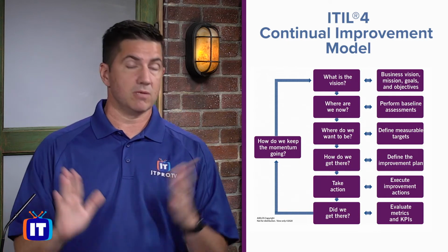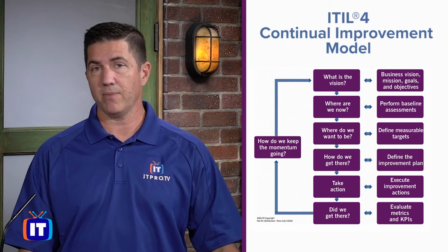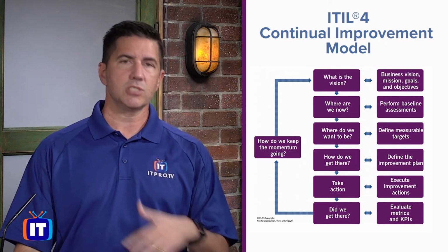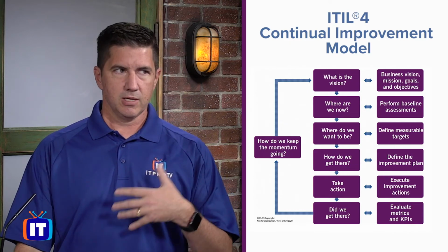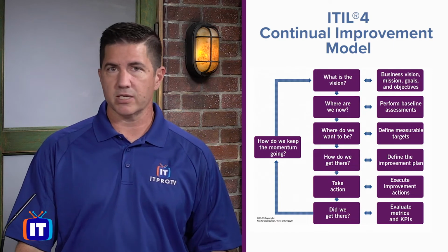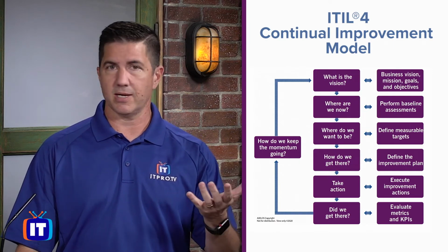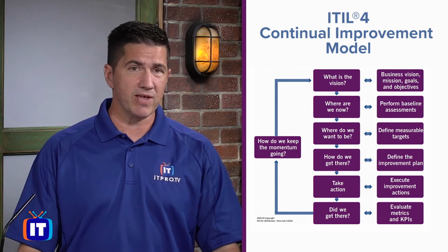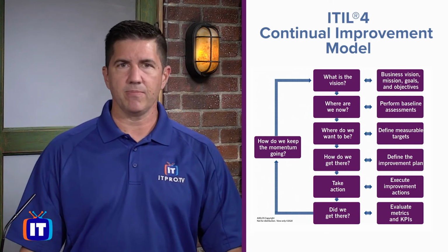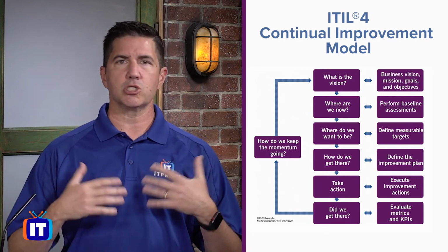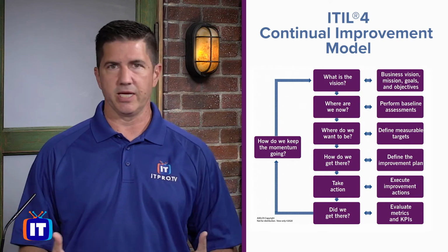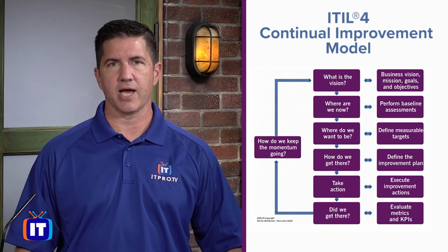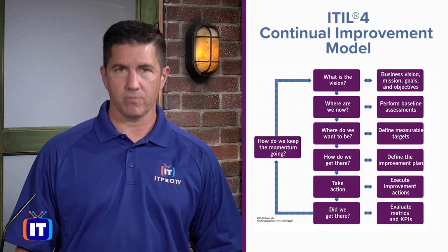Or let's say it wasn't successful. Maybe she only went up 1%. Well, then you still do lessons learned. You still come in and start talking to people and say, all right, let's debrief on this and see what was happening. Maybe you found out that the knowledge base was just too big to clean up. It's too much of a project in 90 days. Okay, we bit off a little bit more than we could chew.